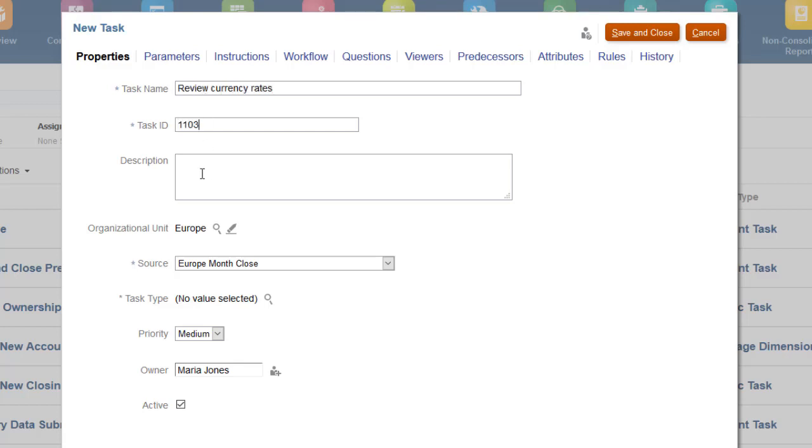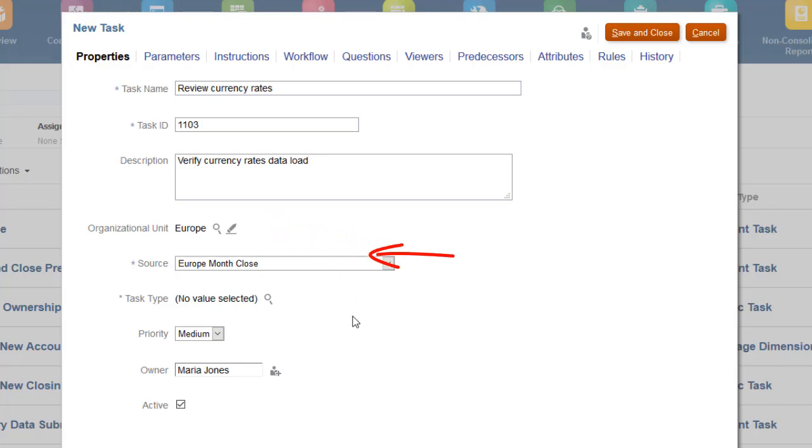Task IDs must be unique. Organizational units are used for scheduling holidays, and also for filtering and reporting. Use the Source field to specify the template to which to add the task. You use this option only if you have other templates embedded in the current template.